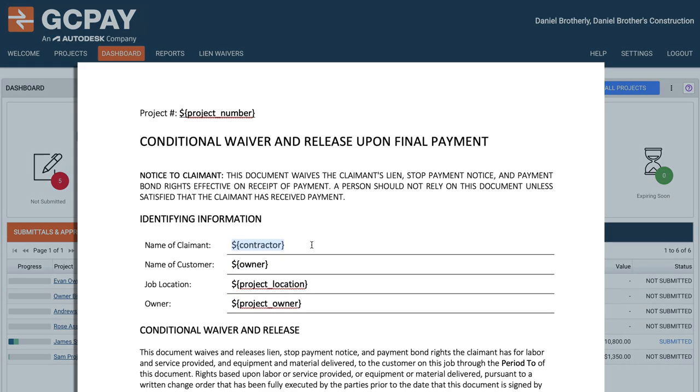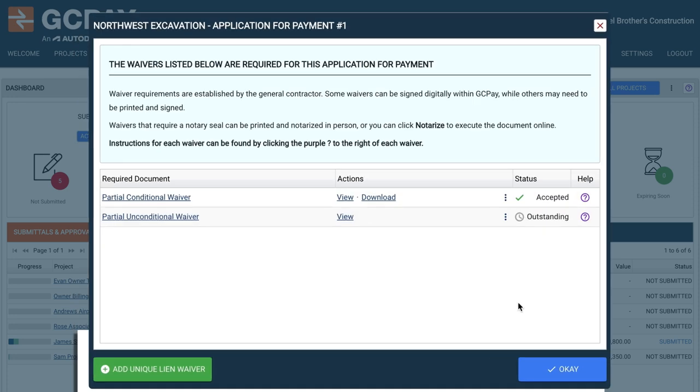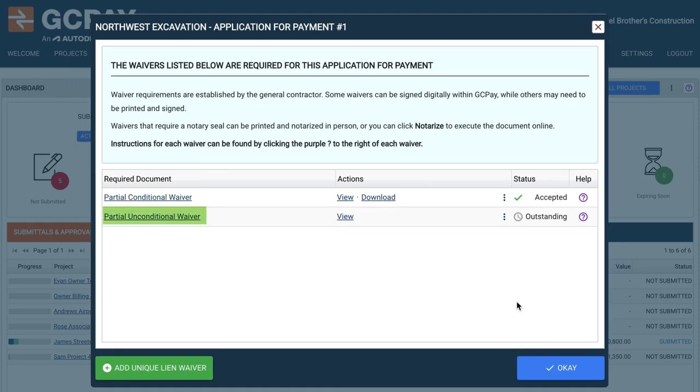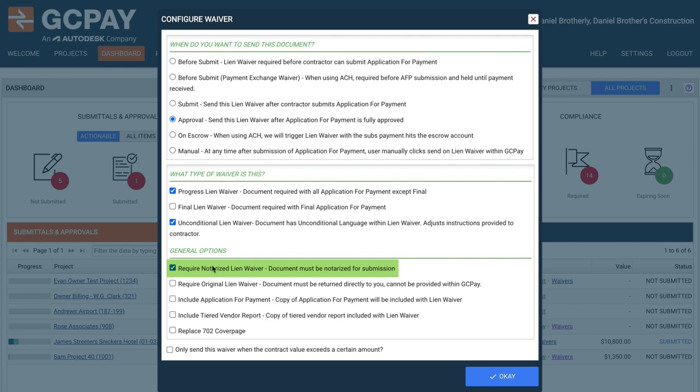GCPay makes creating, uploading, and customizing lien waivers a simple task. Review and manage unconditional, conditional, progress, final, and notarized lien waivers at a glance.